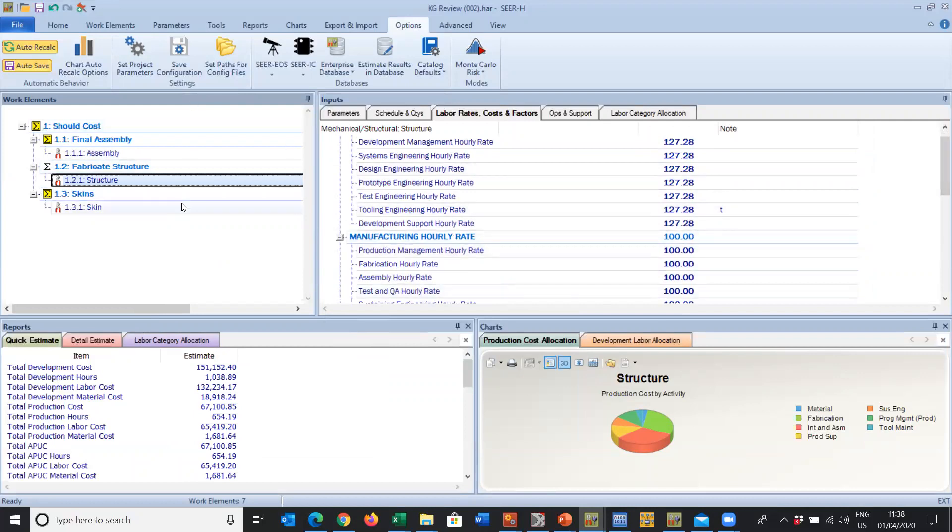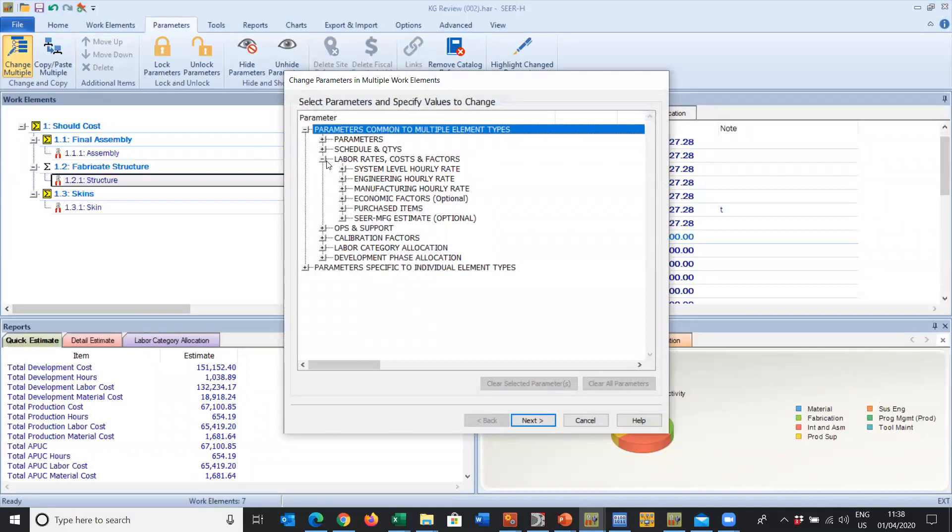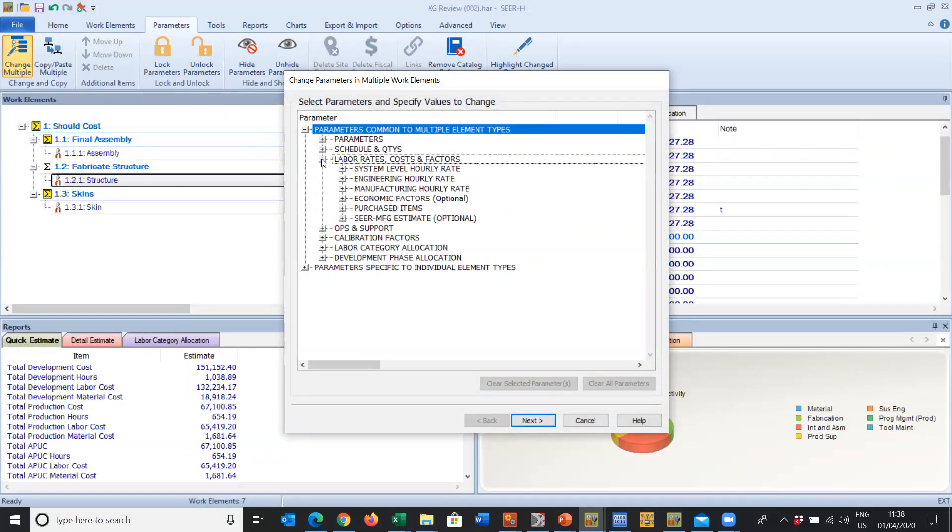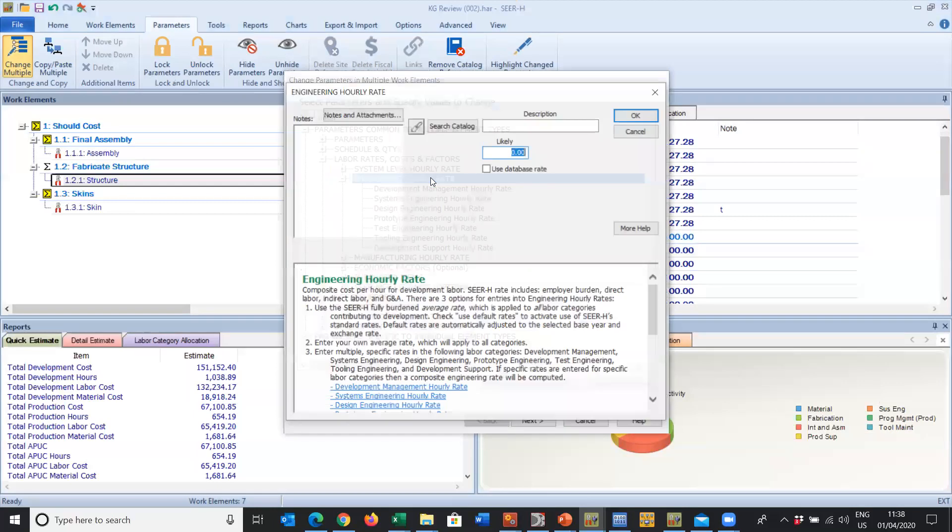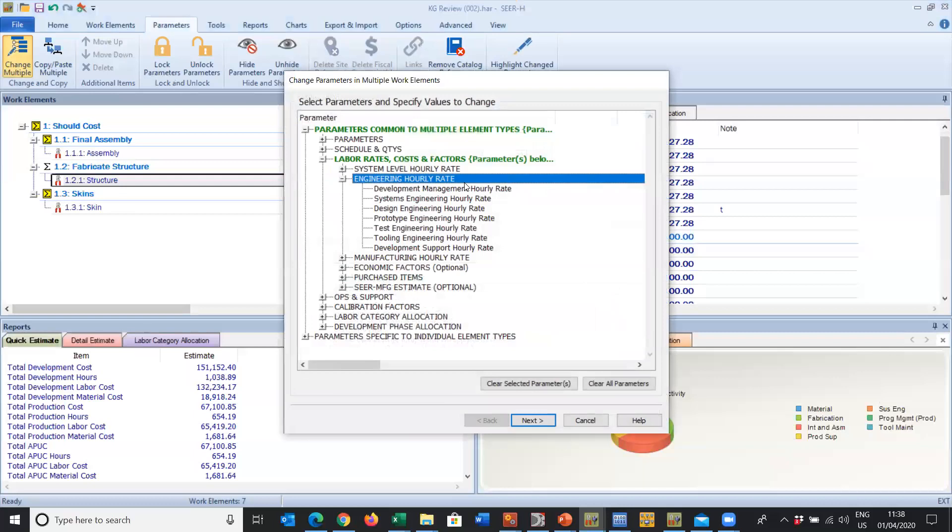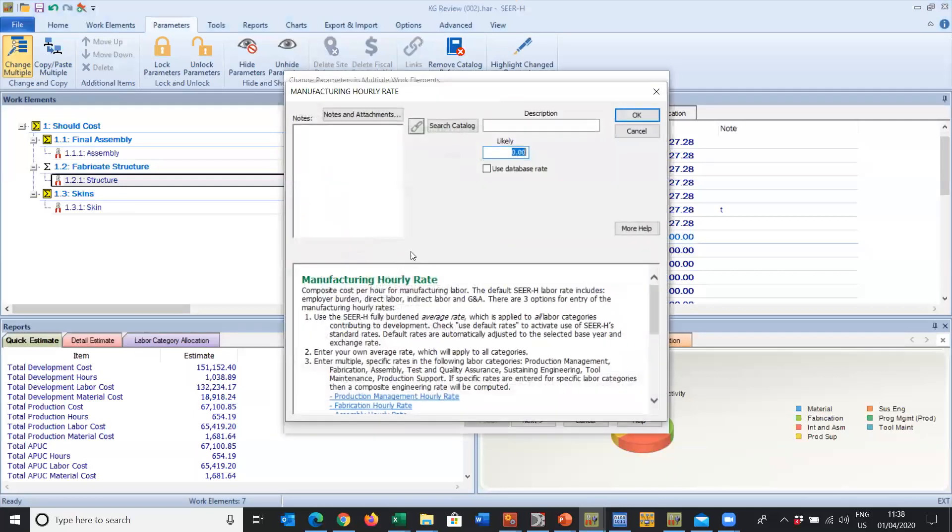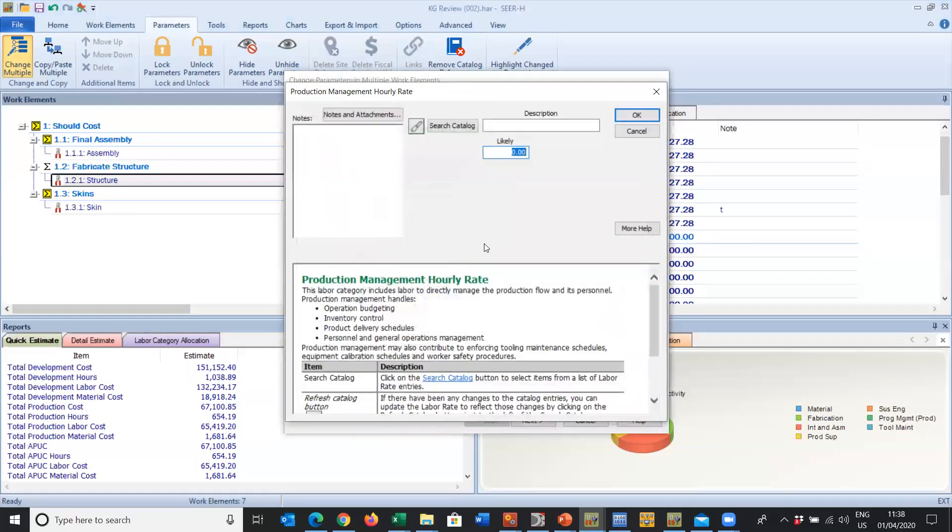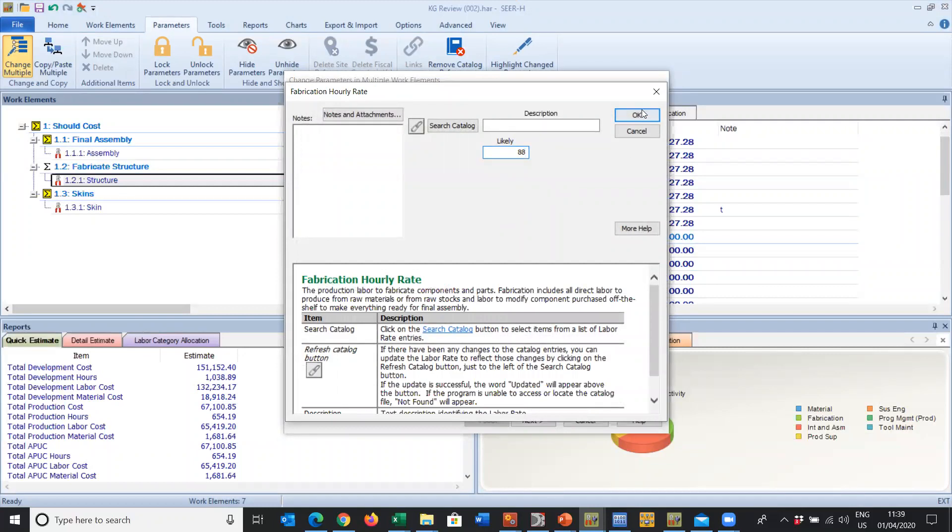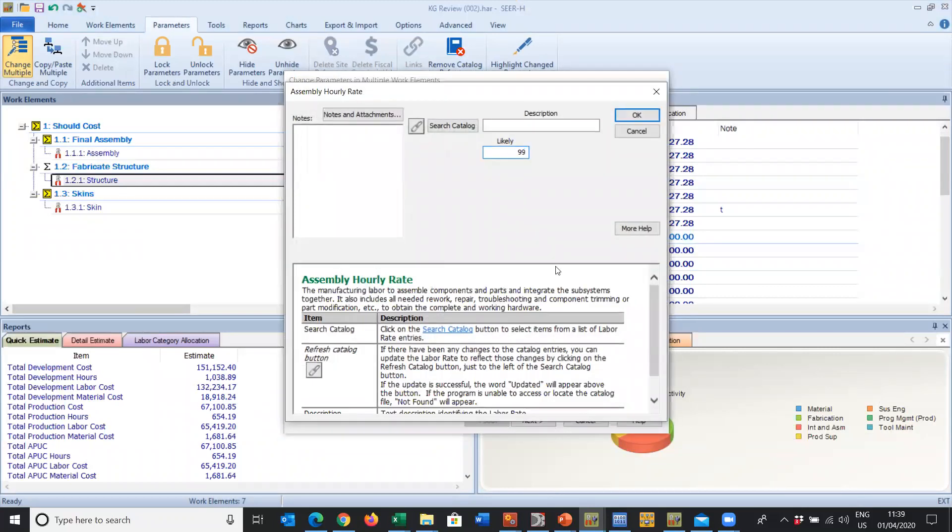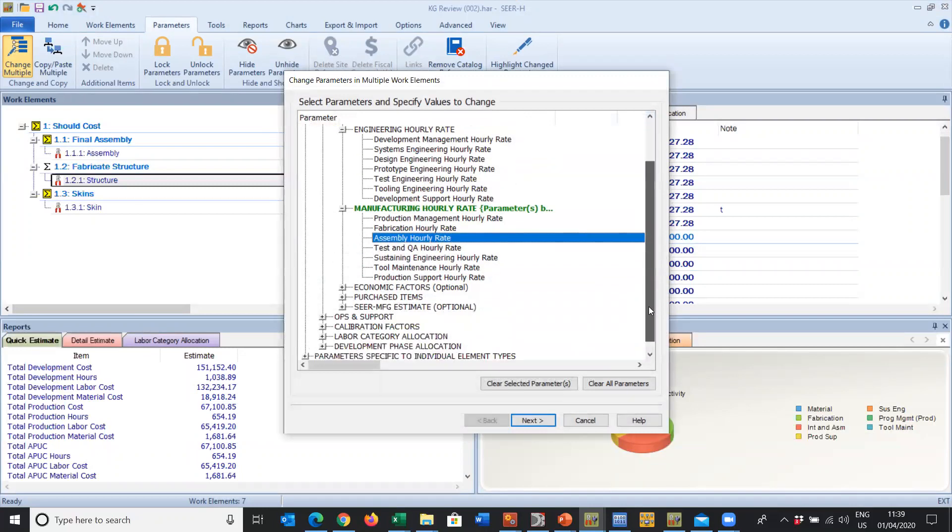If this was a huge long WBS, maybe an aircraft, a ship, something with a lot of work elements, under Parameters we can change multiple parameters. We have Labor Rates, Cost Factors. We can open them up and we can come into the Engineering Labor Rate. Similarly, we can double click at the top line and put our 122 in. We can come into the Manufacturing Labor Rate and put these individually. These are on 77, these guys are on 88, these are on 99, etc.